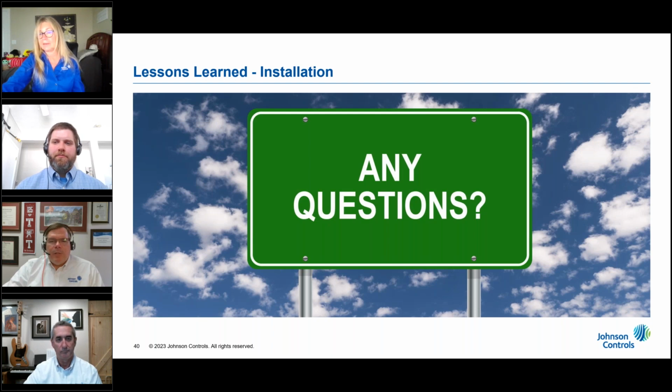I know that you covered it in your presentation, but there was a question about should the AMI network be up and fully commissioned prior to the meter changeout. Your thoughts? I can tell you that it's going to save your installation team, your QA, QC team, and your billing team a lot of time and frustration if you wait until the network is fully deployed. All right.